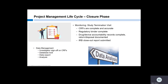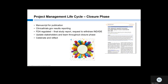Once all of the CRFs have been monitored and queries resolved, this is typically the point where the investigator signs off on the data collection forms. Then the database manager will lock the database to make sure that no data is changed or removed, and export the data to provide it to the investigator and statistician for analysis. The investigators will most likely prepare a manuscript to submit to scientific journals for publication. If the study was an applicable clinical trial, remember that results reporting is required on clinicaltrials.gov within one year. If your study is also FDA-regulated, you need to submit a final study report to the FDA. Discuss plans with the IND or IDE with the sponsor investigator, and if they do not plan to conduct another protocol under the same IND or IDE, include a request to withdraw the IND or IDE with the final report to FDA.